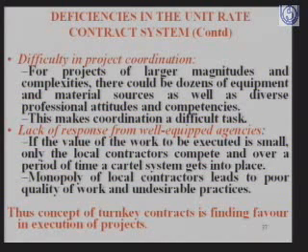That is why good contractors, the well-equipped agencies, do not come forward to take up unit rate contracts. Because of this, local contractors gain monopoly, and they do not do good work, and at the same time they indulge in undesirable practices. So the lack of response from well-equipped agencies is another drawback of the system.